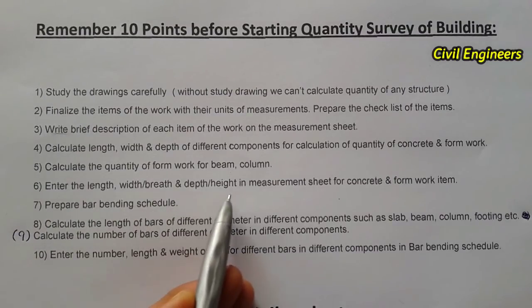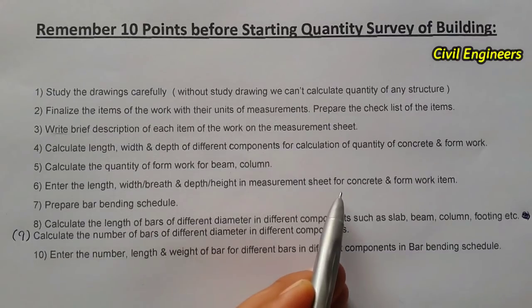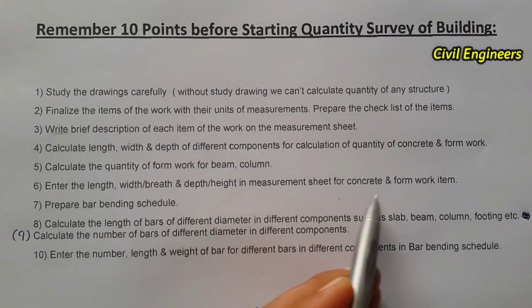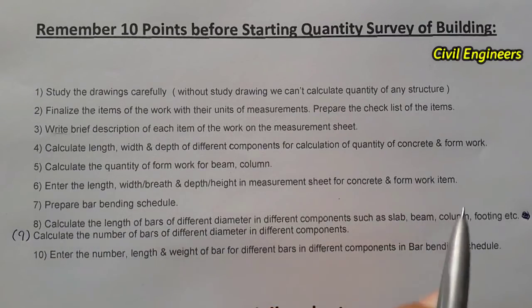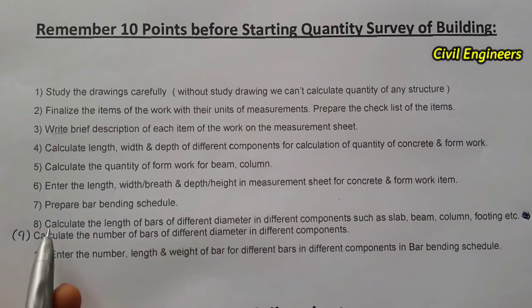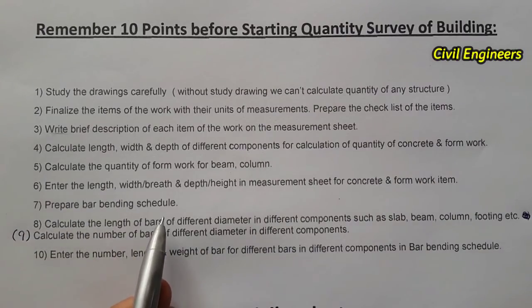The sixth point is to enter the length, width, breadth, and depth or height in the measurement sheet for concrete and formwork items.